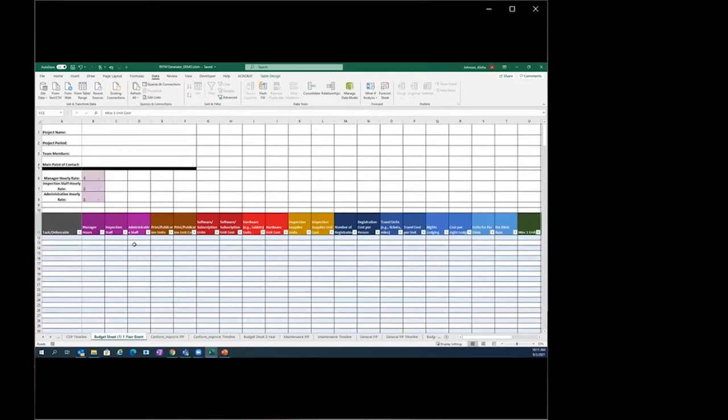So when you get to the budget page, really what it's asking you to do is to start with entering in your tasks or deliverables in the first column. So whatever deliverables, action items, etc., that are pertinent to your funding requests would go in this first column. If you're asking for funding to offset any staff time, you would enter in the hours associated with each task and deliverable here. And we did a neat function where all you need to do is enter in the hourly rate once for each different position for what you're asking for funding, and it will calculate it all the way through. That way you don't have to keep typing the same amount over and over again.